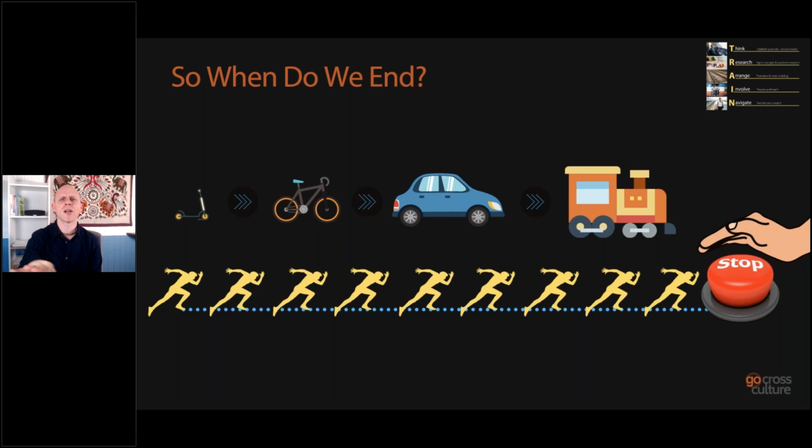Maybe we'll add a search feature, but putting online payments and all that stuff is so complicated. The organization is not ready for it yet. Let's just keep it as tick the ones they want, send an email through with their contact details, and we'll follow up with customer service and take payment over the phone. Much quicker, much easier, faster time to market. Let's get it out there, and that's my minimum product.